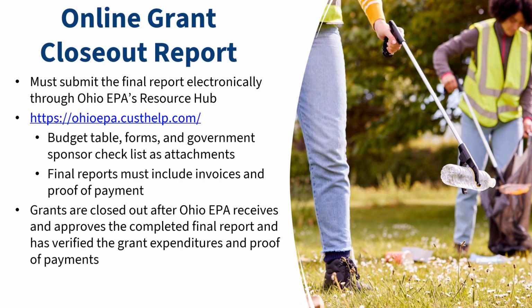So next is the big piece, the online grant closeout process. So what is that? The grant closeout is the process of submitting your final reports, invoices, and other documentation to Ohio EPA. This is how you finalize your grant project and close your books with us. This is required, and you will not receive any of your remaining funds until this is submitted and approved.